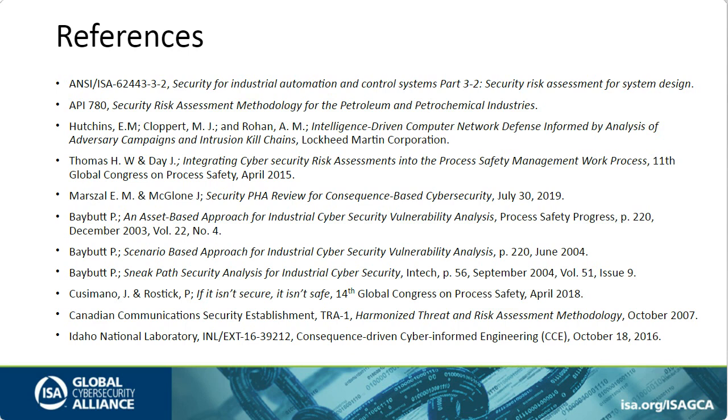The pat answer is as early as possible. You should be doing the initial risk assessment as soon as you know what types of devices you're going to be specifying for a capital project.